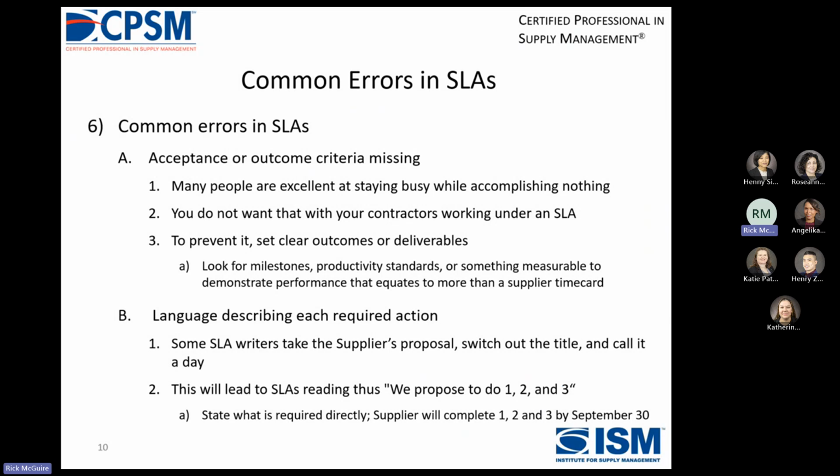Language describing each required action. Some SLA writers take the supplier's proposal, switch out the title, and call it a day. This will lead to SLAs reading thus: we propose to do 1, 2, and 3. State what is required directly: supplier will complete 1, 2, and 3 by September 30.